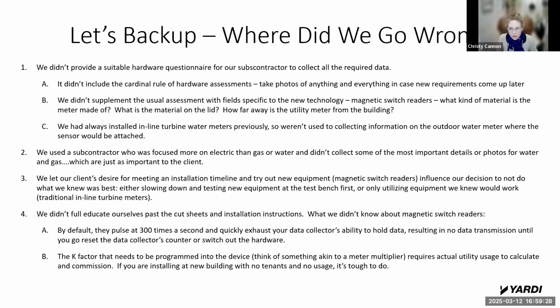And we also, because the site assessment was going out to look for installing inline meters, not magnetic switch readers, things like what is the water meter made of, what kind of lid is it, those kinds of things were not even on the assessment. We didn't even think about that.